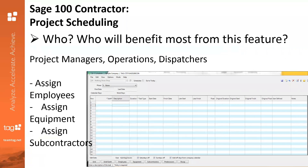You can assign employees, equipment, and subcontractors to the tasks in each phase of the project. You can see here a blank slate of the schedule — there's some customization you can do, like hiding columns. One note: resource scheduling does not automatically warn you of potential conflicts. When utilizing this, you'll want to produce schedules from the resource reports within scheduling and then compare resources to stay on top of any conflicts and communicate automatically to everyone on the project to keep people on task.